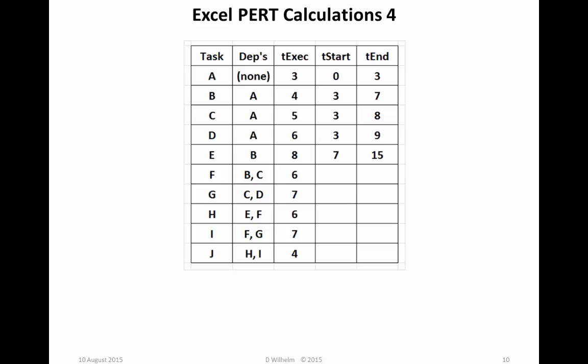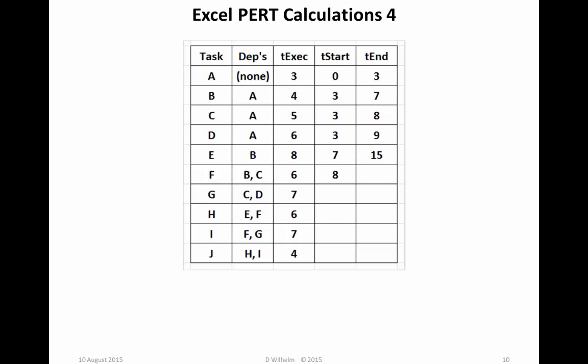Now it's going to get interesting because task F has two dependencies, task B and C. Both must be finished before task F can start. So Time Start F equals the maximum of those two dependencies, max of tEnd B and tEnd C. We enter that formula in the tStart column for task F. And that turns out to be 8. And if we go back and double-check, sure enough, Time End C is greater than Time End B and Time End C is 8. So that's what we see, and that's what we should see.